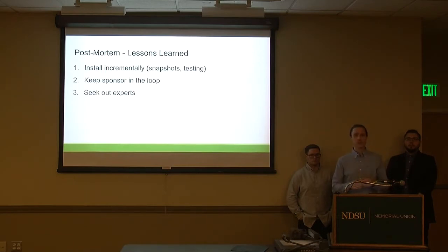It's also been really important to keep the sponsor in the loop. For the first half of the project, we've been meeting with John Deere pretty much on a weekly basis. And then in the second half, we were able to ease up a little bit and do maybe every other week, every 3 weeks. And this was really great for us. When we started the project, it gave us a way to very quickly dive in to understand what the project was about and what we needed to do.